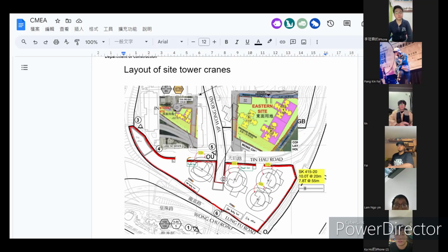The second is placed strategically to serve block 2, while also assisting the steel reinforcement stage. The third one can minimize noise disturbance as it is along one row. And the fourth serves block 4, carefully considering the radius coverage to ensure safe operation near the road.